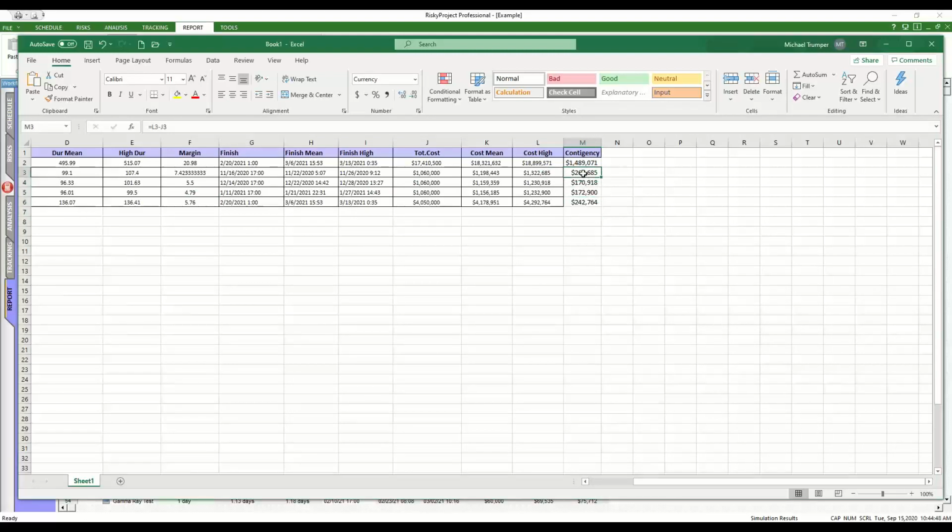So if we wanted to, you set aside so much contingency, and once that's completed, you can retire whatever contingency is left over. This gives us a quick idea of how much risk-adjusted, so realistic, margin is based on the actual level of risk in the system, what we call protecting your project deliverable dates and budget.